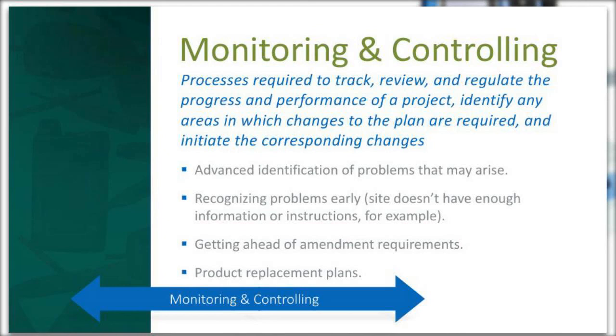One of the things that we've seen come up is something as simple as a data logger. These data loggers that monitor the temperature of the medication when a patient takes it home, they are a piece of electronic equipment, even though some are fairly simple in how they're developed. That being said, not everybody who is involved with handling the data loggers has been exposed to them on any level before, even though the people who are supplying them may not have recognized that. So once they got to a site, some of the sites did not know how to download the data from the data logger once the patient returned it after utilizing it for their medication.